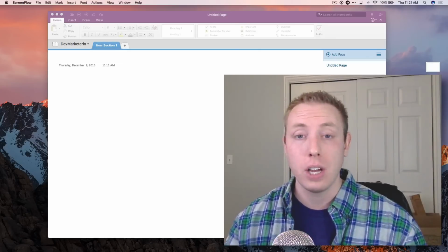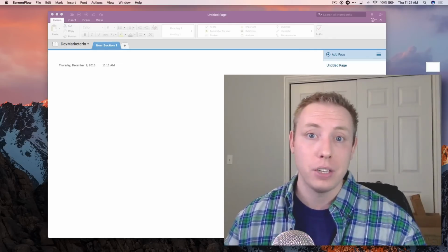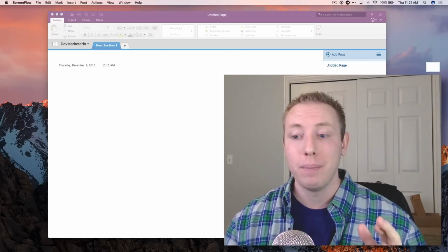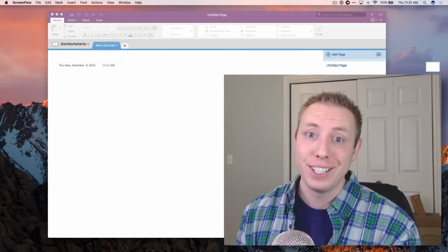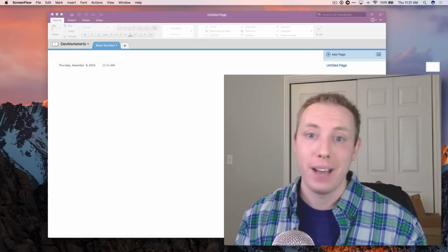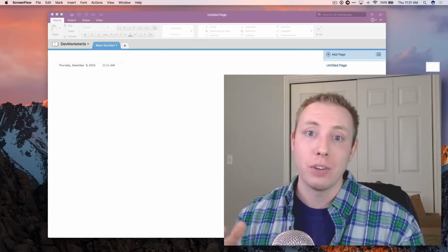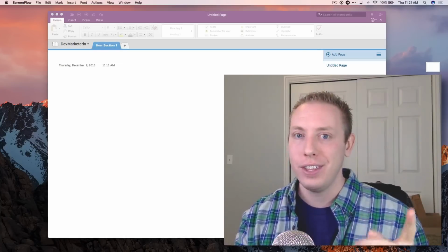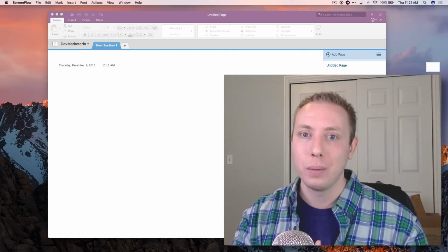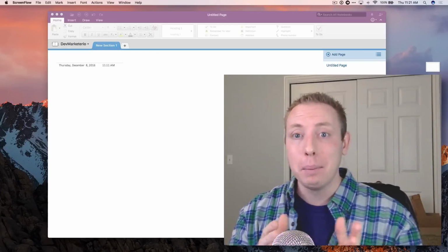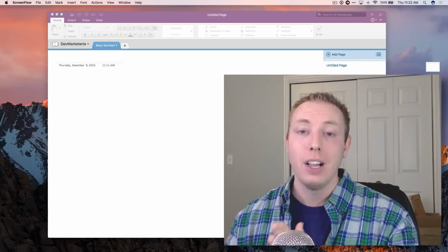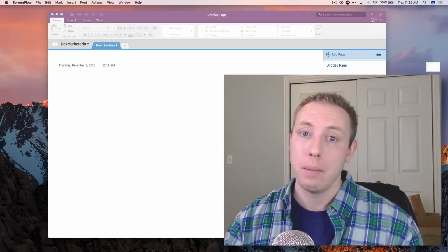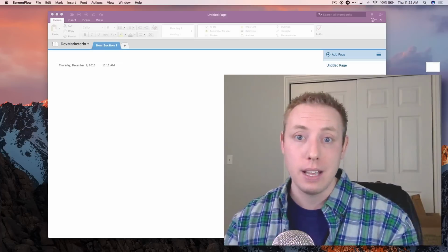What's going to happen, I promise you, is as you get to phase 3 where you're actually coding the website and getting to the end of the project, or maybe it's step 4 when you're in QA, the head of the project at your client starts showing the project to other people, the heads of other departments. And then these people will start speaking up and say, wait, why can't we add this feature or this feature? It'd be really cool if we did this since we're rebuilding the website. And because they didn't get brought in until the very end of the project, a lot of times that stuff either gets rolled over and never gets done, which makes them upset and doesn't accomplish the needs of your client.